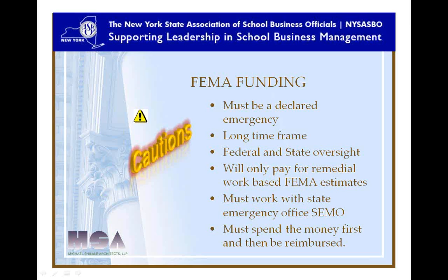And FEMA will only pay for the remedial work, and it's based on what they believe the cost estimate should be. So we had to do some negotiating. In certain parts of the state, it's much more expensive than what FEMA believes to do construction work. So that's always a negotiated thing. They will work with you, however, including the State Emergency Management Office, or SEMO. And one of the other cautions is that you have to spend that money first, and then they'll reimburse you. But it is a way to get some extra dollars.